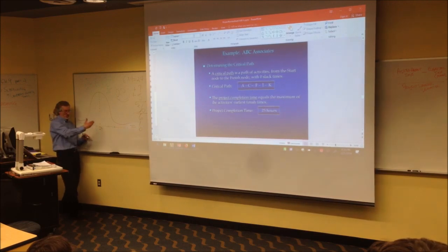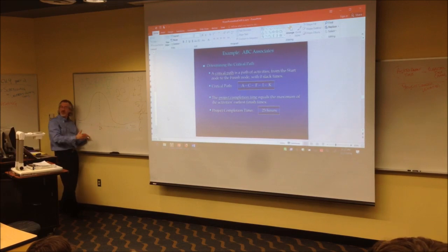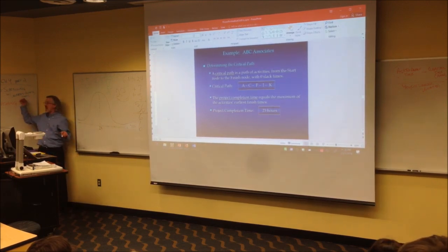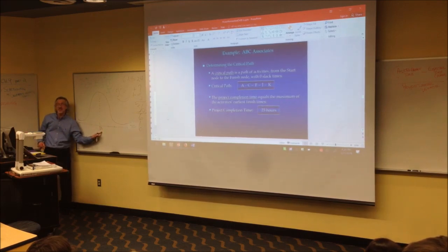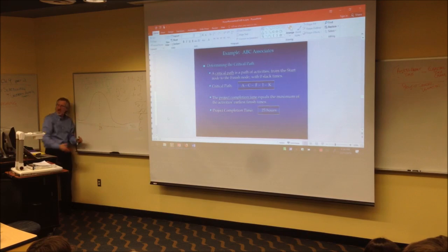50%. What's the probability this project will take 23 units of time or more? 50%. That's what you calculate with uncertain activity times. When you change all the times and do your forward pass, you're calculating the mean, which is 50%, 50%.